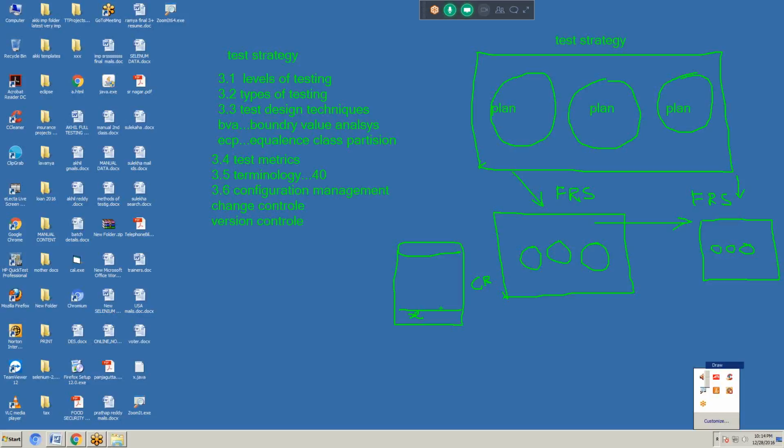We can feel confused because we are using it as a reference document. In the FRS the customer said two buttons, but the application has three. That's the reason each and every software company maintains change control. If any changes are made by the customer, company, developer or tester in the application, parallelly we need to update the information into the FRS. That is called change control.